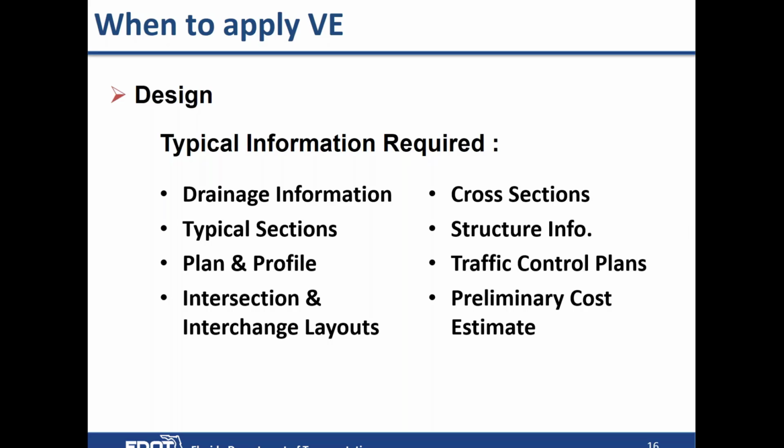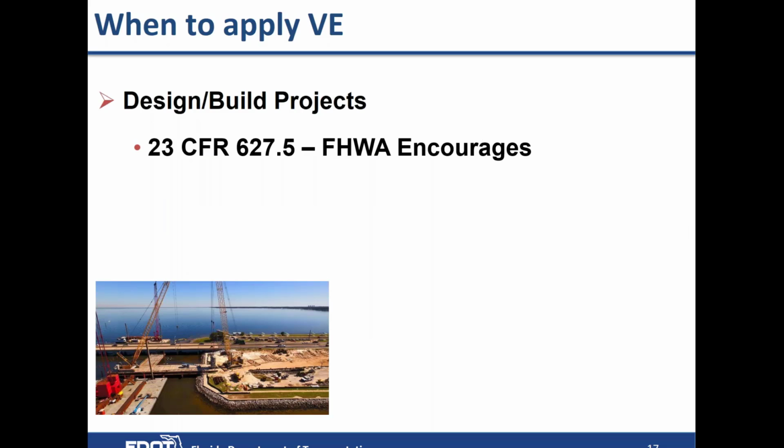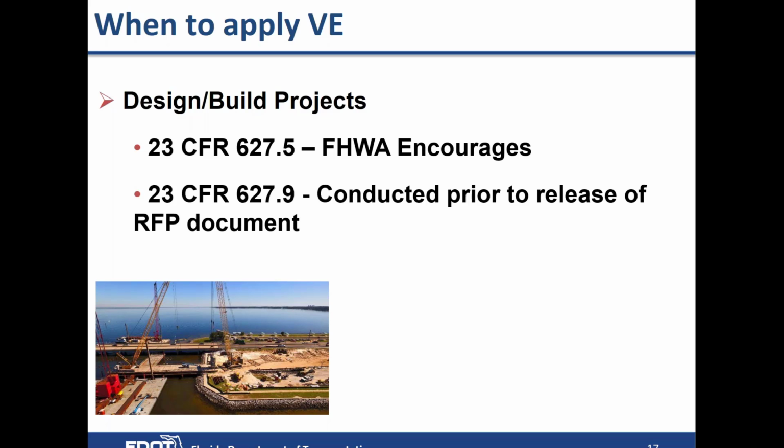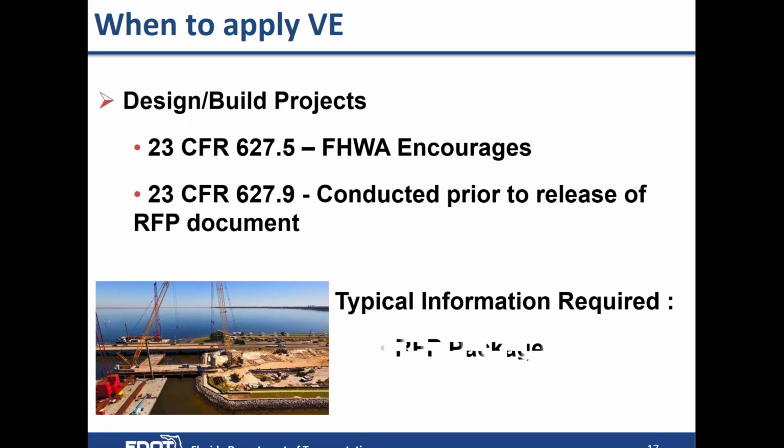You'll probably have some cross sections, and your estimate's going to be more refined and closer to where we're trying to get to. Design build projects, as I mentioned, now they're just encouraged through regulation. They're not required, but if they are done, they're conducted prior to the release of the RFP document, or RFP also meaning request for proposal document. And a typical information required is that request for proposal package. And the team will study that and see if there's any improvements that they could recommend that would make it a better document.